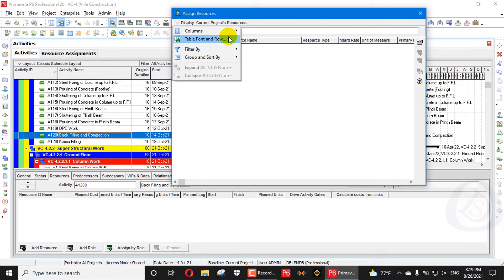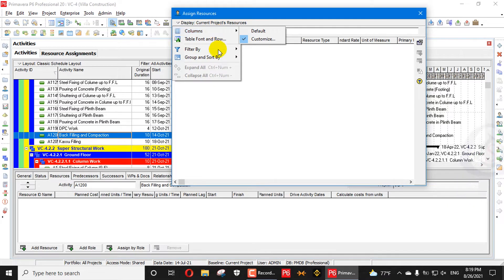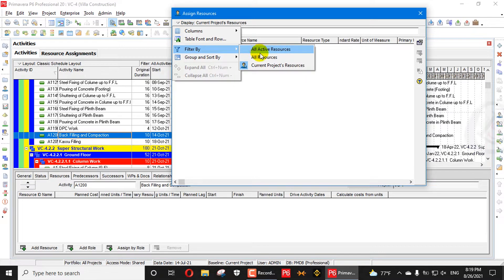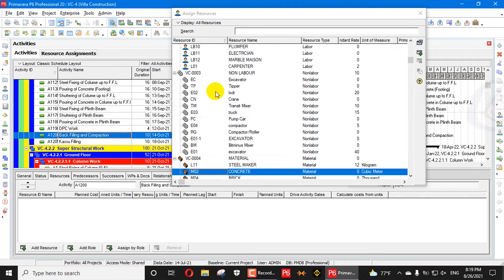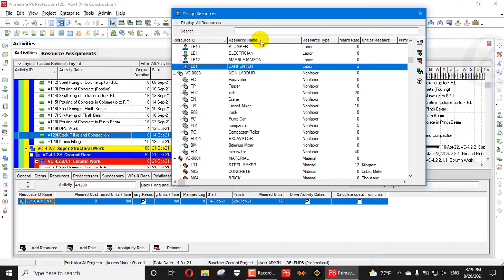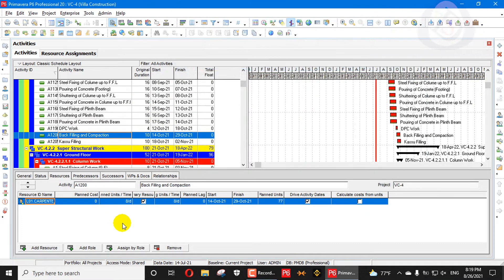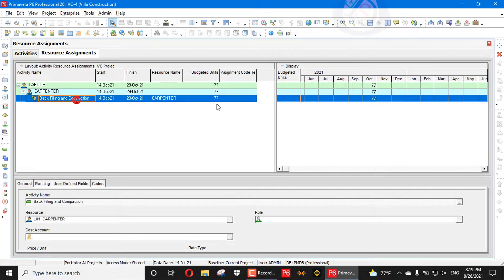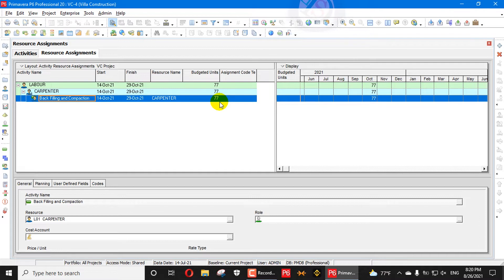If I go to Activities and try to add resources to an activity, it shows no current project resources. I will filter by all resources and assign, for example, a carpenter to this activity — just as an example. If I assign this one activity, you can go to resource assignment and see 77 hours to do work in October.